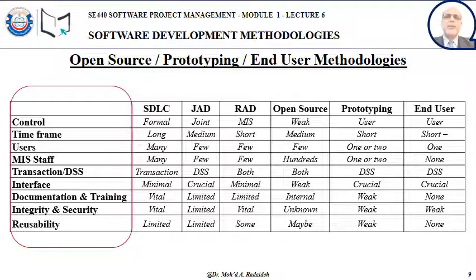So you show them what you did, they see the layout, and they may give you some feedback on that. However, that does not mean you would give it to them to use it as in the incremental and iterative project management approach. It is only to keep their attention with you, and you would be doing that every few weeks or every month or so.